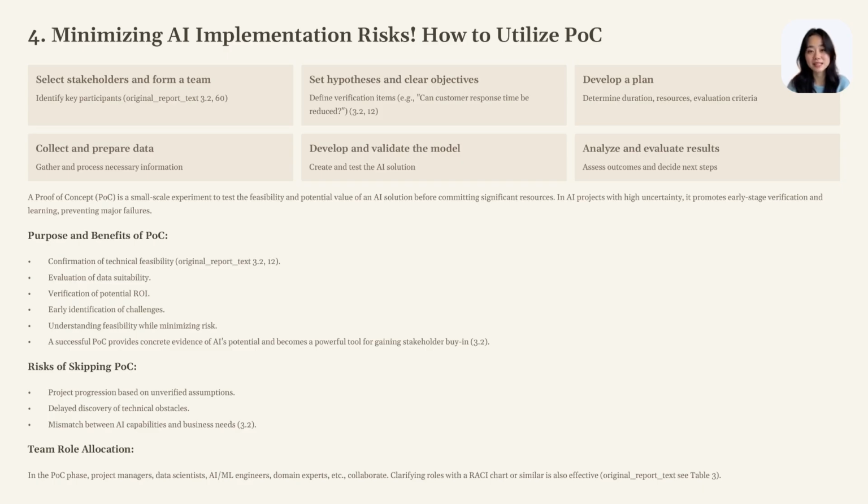Next, set a hypothesis and a clear goal, that is, what you want to verify. For example, it is important to ask a specific question such as, can the introduction of an AI chatbot reduce the time it takes to respond to customer inquiries by an average of 20%? After that, the general flow is to formulate a plan, collect and prepare data, develop and verify a model, and finally analyze and evaluate the results to determine the next step.